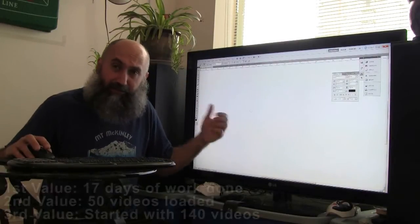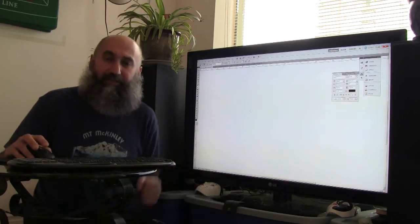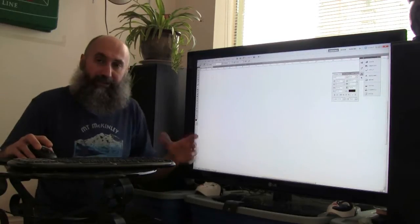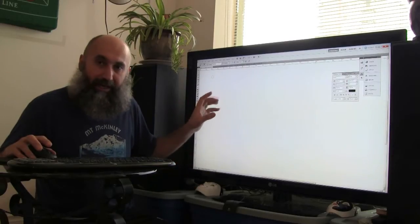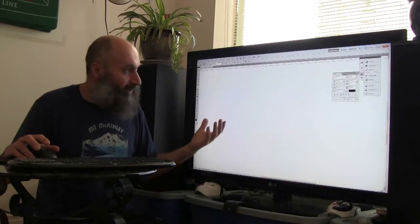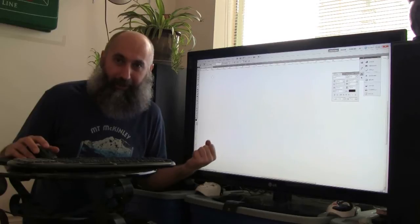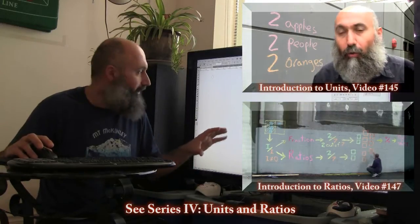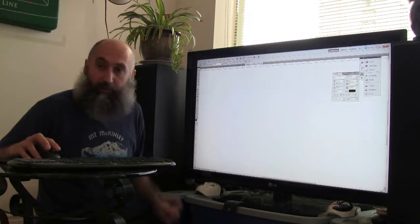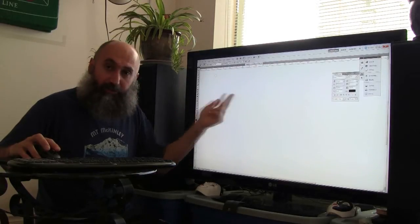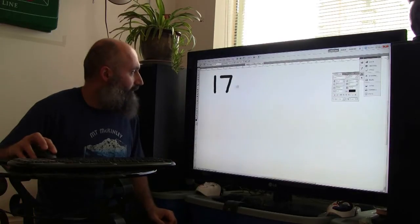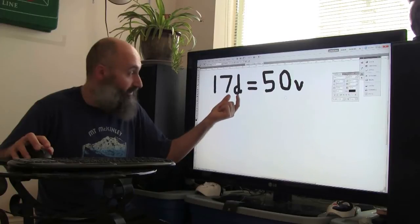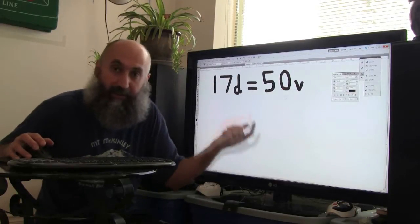I've done 50 videos out of 140, and it's taking me 18 days to do those 50 videos. I need to figure out if I'm on schedule with my two-to-three-month timeframe. We're going to create a unit conversion anchor point and use ratios to do this calculation. The anchor point is: 17 days equals 50 videos — so 17D = 50V, where D represents days and V represents videos.